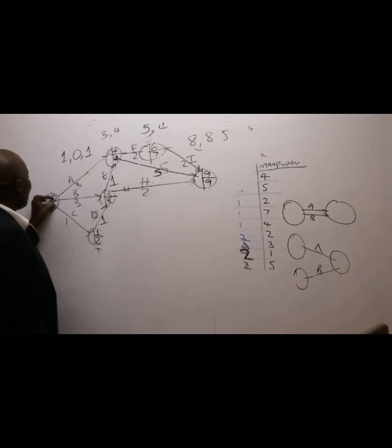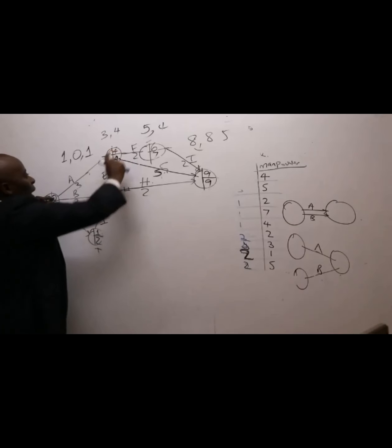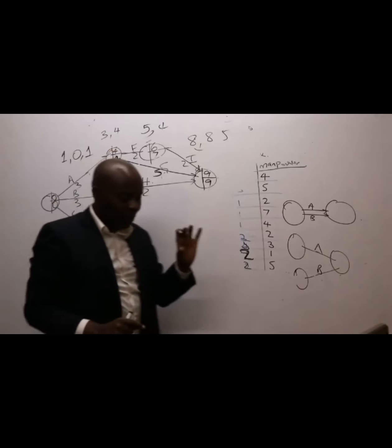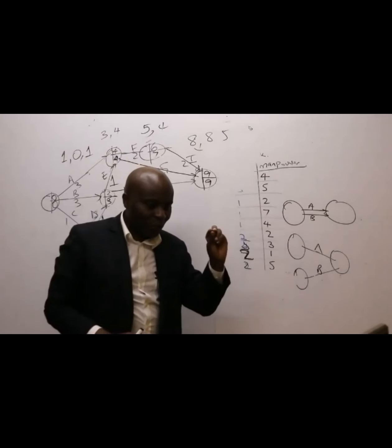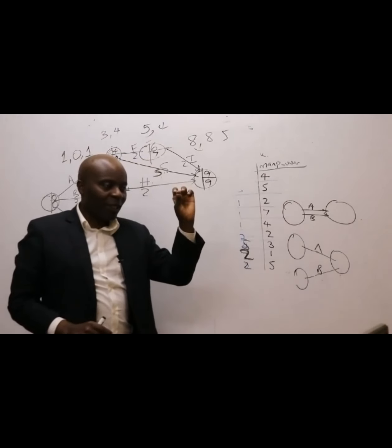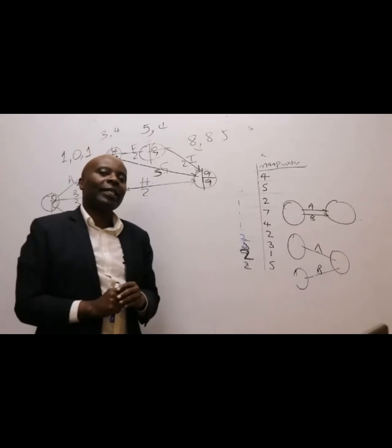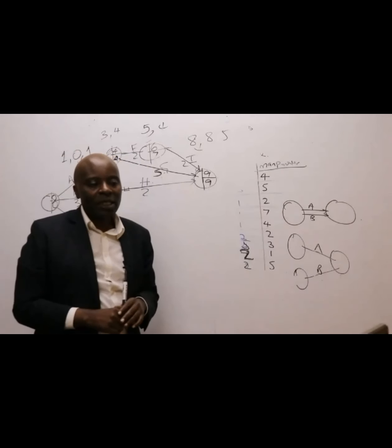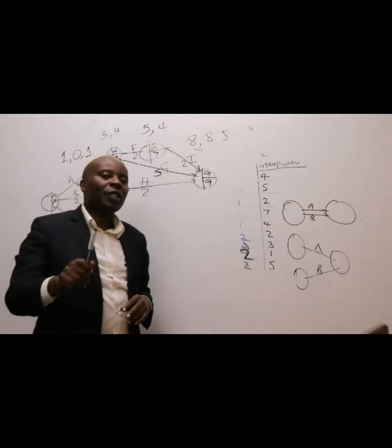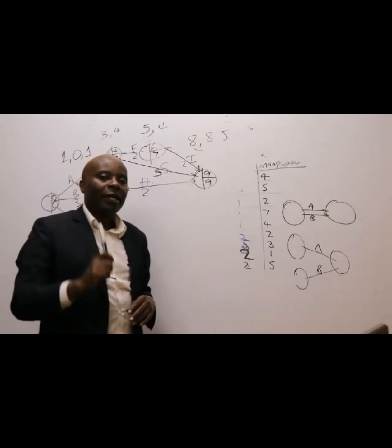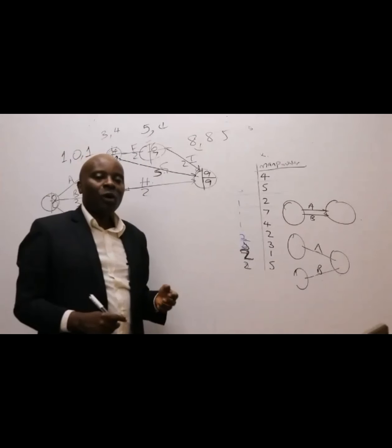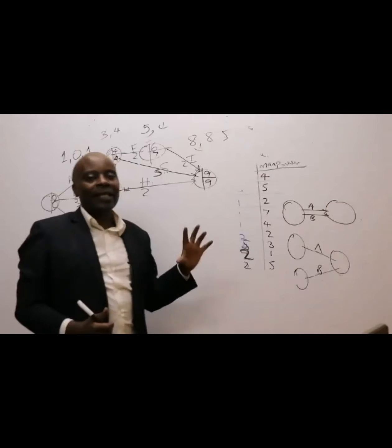You can say, for example, 0, 0, 4, 4. You say 0, 0 because there must be that matching concept: 0, 0 at the tail, 4, 4. That is a potential critical activity. But now remember the sufficiency condition.